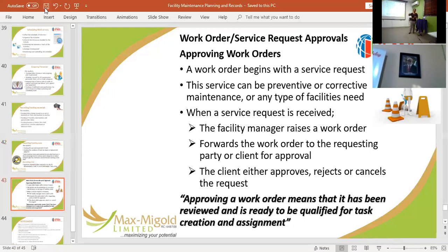This is how much, this is what I'm going to need to do. I will specify the kind of doors I want. Do I want this type or do I want to change them? So they will now go with what I have specified and create a cost. I will now take the 3 and decide which of them I want to work with. There's always a criteria for selecting. When that is done, I can now send it to the head office. If the funds are available, they can approve. After approval, it will come back to me.